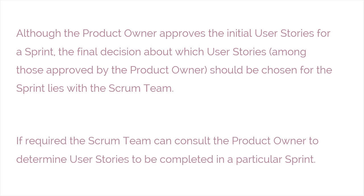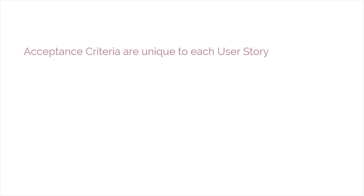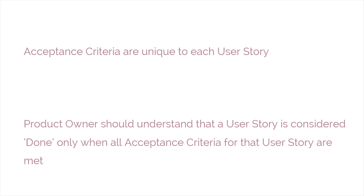However, if required, the scrum team can consult the product owner to determine user stories to be completed in a particular sprint. Acceptance criteria are unique to each user story and are not a substitute for a requirements list. The product owner should understand that a user story is considered done only when all acceptance criteria for that user story are met.